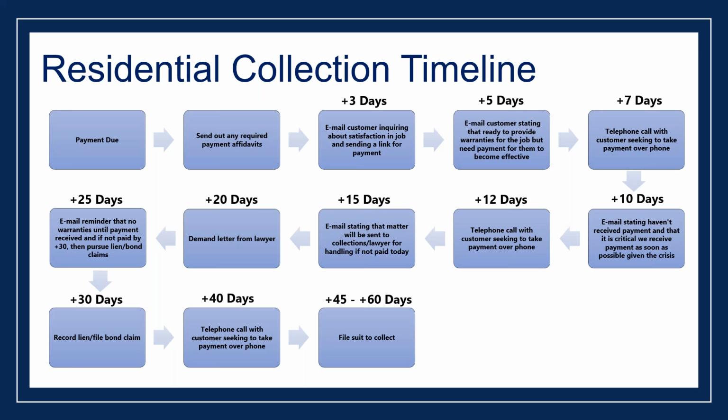Okay, you start off when your payment is due. It may be when the final inspection occurs. It may be when you've completed work and given out the closeout documents. You send out all those affidavits and other things that are needed in order to get that final payment. And then if you haven't gotten paid after you submit it within 3 days, you email the customer asking them about satisfaction. Customer service and AR go hand in hand. So you want to make sure you've got a happy customer, and then send them a friendly link for payment. Okay, you want to be able to grab payment immediately.